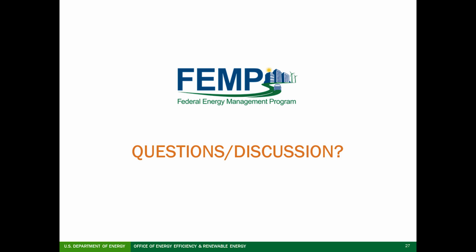Thank you, Dave. I have another question here. It looks like it's for Nick. And the question is, will the retuning activity involve making adjustments to the HVAC system? Yes, absolutely it will. And as a follow-on thought to that, because we are making adjustments to the HVAC system, it is really critical that at least a vast majority of the systems and components, the VFDs, sensors, actuators, must be in proper working order. So we really don't want to encounter the situation where we visit a building where the sensors aren't reliable and things are overridden and things like that because they haven't been commissioned.